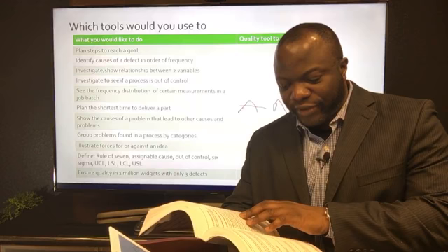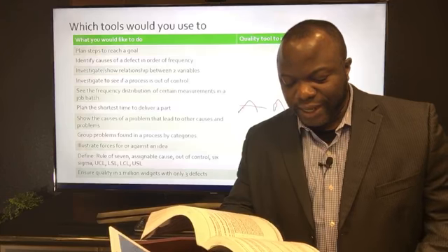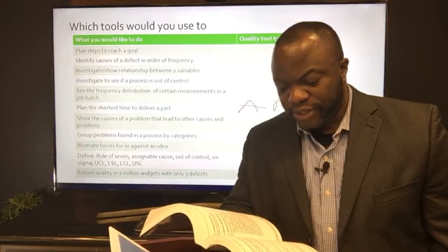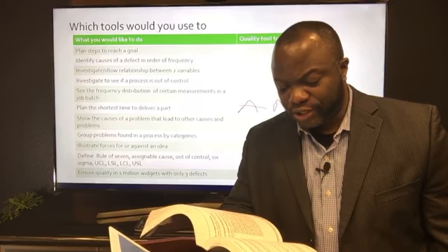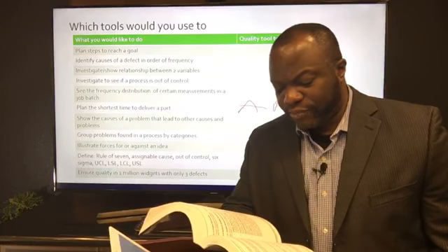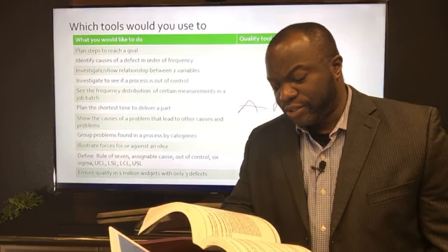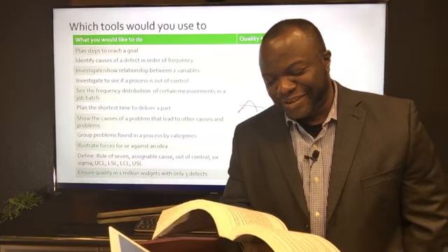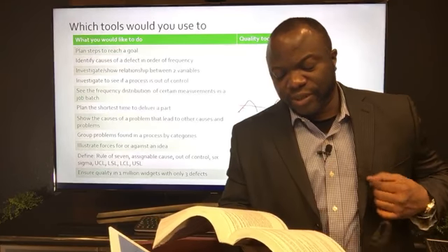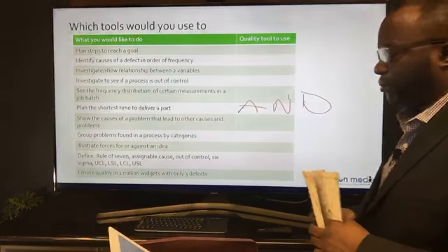It says on page 245, an adaptation of relationship diagrams. The interrelationship diagraph provides a process for creative problem solving in moderately complex scenarios that possess intertwined logical relationships for up to 50 relevant items. The interrelationship diagraph may be developed from data generated in other tools such as, watch this, the affinity diagram, which someone mentioned, the tree diagram, which someone also mentioned, or the fishbone diagram, which lots of people chatted in. So this takes it a little bit further, and analyzes cause and effect webs. I call it a cause and effect web.